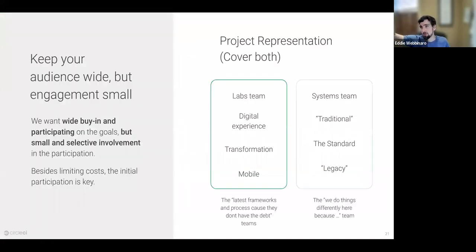Getting those adjacent concerns from all the teams, we can then keep pulling this down into our individual application teams, the front lines. When we go about kicking off a POC, I will not let customers come in with a single, easy thing to do, right? Let's just pick something easy and make sure it works. Because your team's jobs are not easy. The individual contributor's job is not easy, and that is not representative, and it does not create the confidence that you need or they need to move forward with the tool selection.